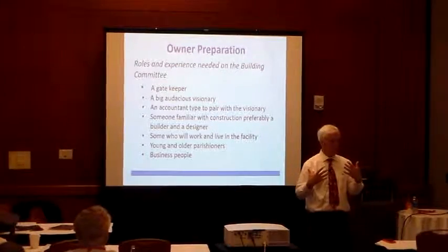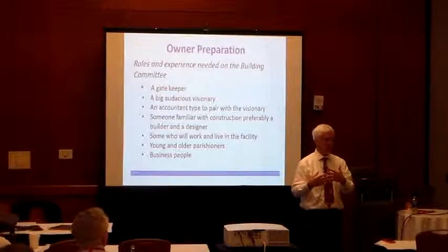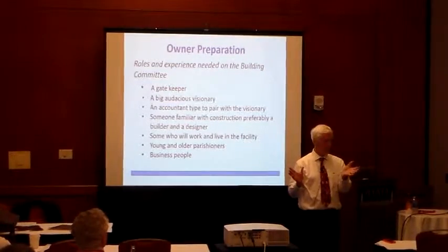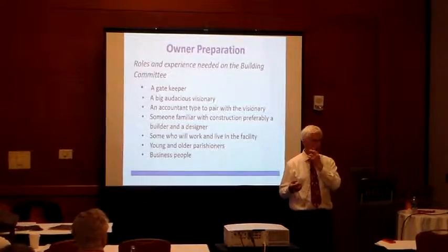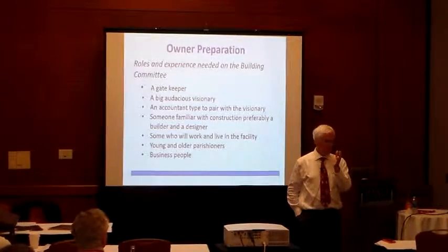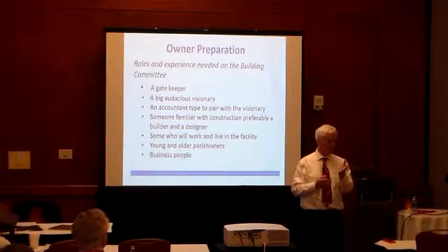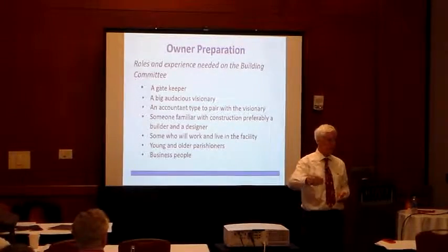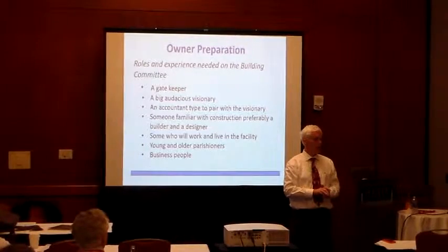The CM and the owner then sit down and open those bids and review them. Every number is completely shared with the owner. And sometimes you may or may not pick the low guy because you find out that if they didn't include this, you can put it in red, blinking, big bold letters and they'll still leave it out.